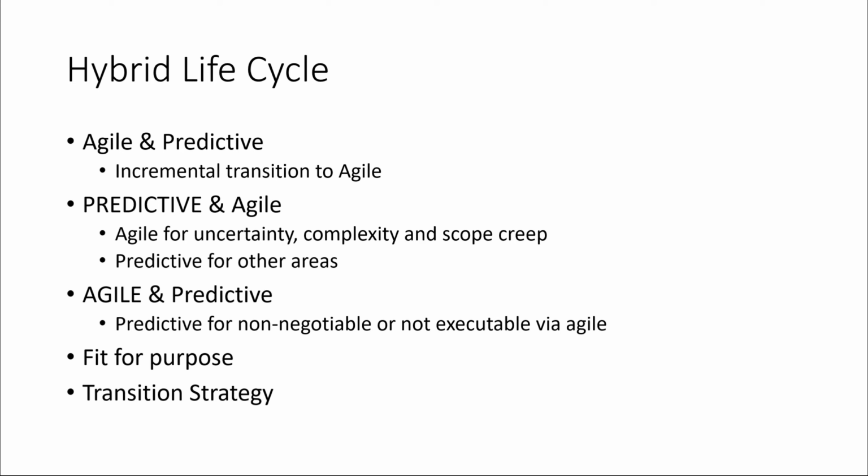Try these new techniques on a less risky project with a medium to low degree of uncertainty. Then, when the organization is successful with a hybrid approach, try more complex projects that require more of those techniques to be added. This is a way to tailor the progressive hybrid transition to the organization's situation and specific risks and the team's readiness to adapt and embrace the change.